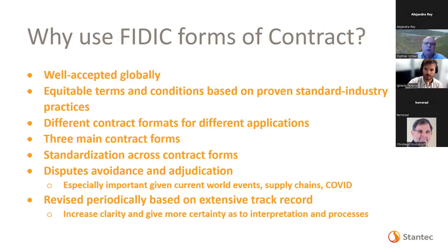If all falls apart, I don't have to load up my bid price considerably with contingencies. The contingencies I will deal with under this other forum here, and we can hammer that out ourselves. The whole world has changed that way.